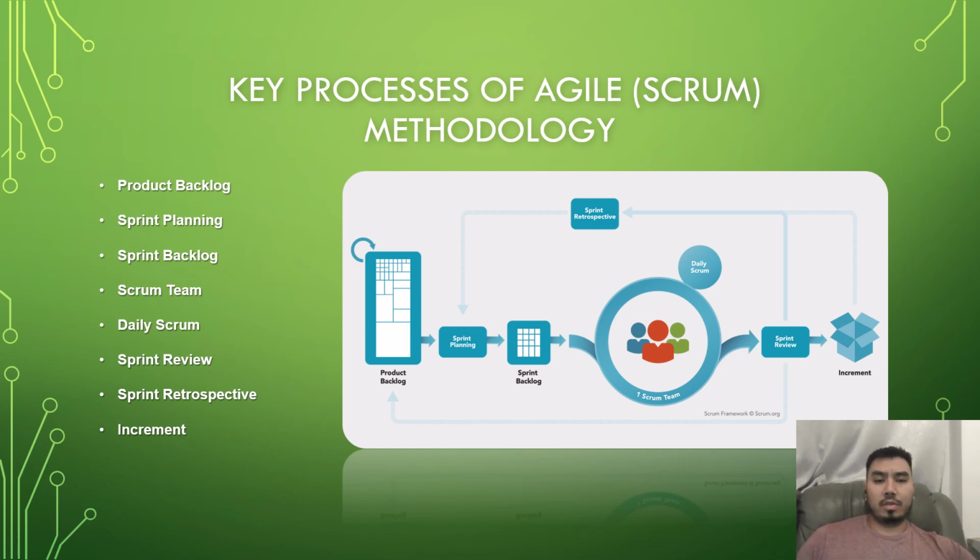and there they will speak about their problems, issues, challenges, and success stories. Then at the end of the sprint, they will review the sprint, and then they will deliver the increment to the customer. If there are any changes needed or any feedback or reviews from the client, the team will take it and review the feedback, and then they'll go back to the backlog and take some more requirements. And if changes are needed, they will do the changes as well.